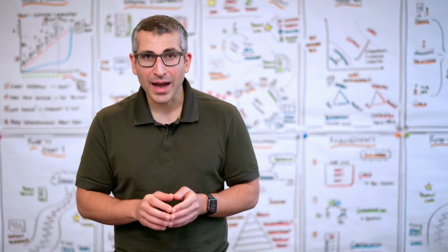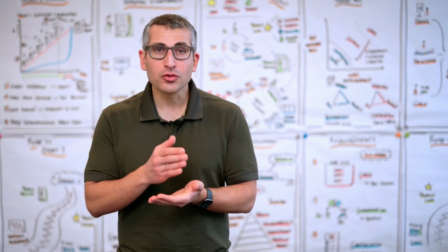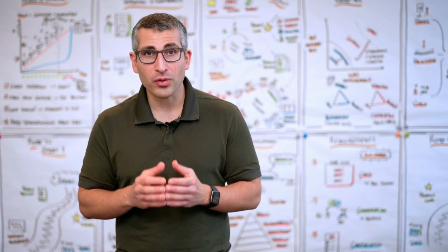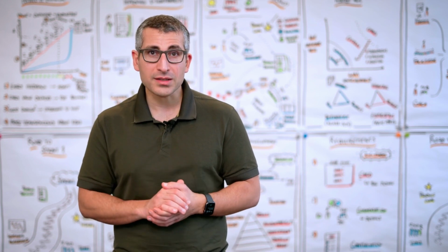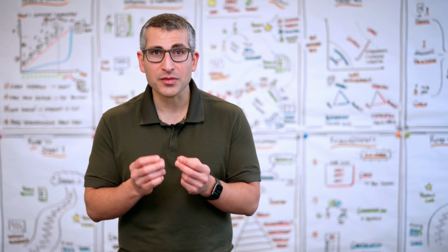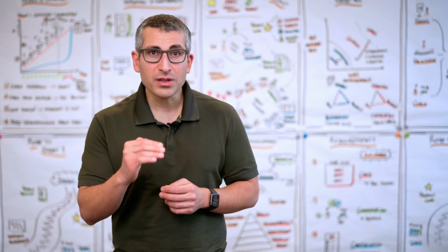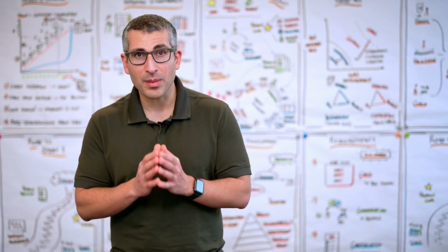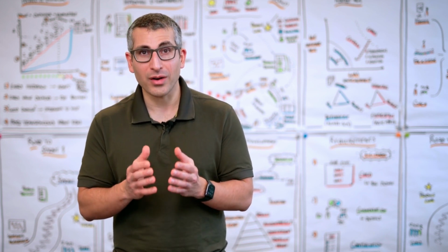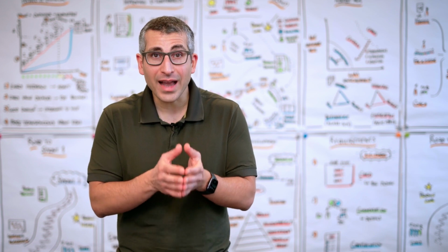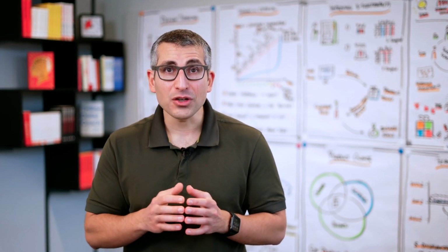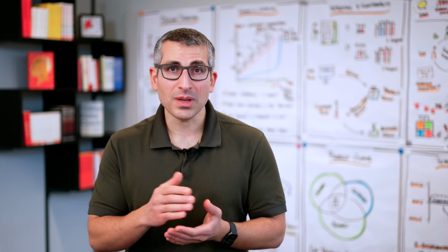You can also apply the work in progress limits to drive further collaboration, to drive, for example, pair programming, or pairing if you're not working in a software context. Let's say again, you have a team consisting of 6 team members. If you reduce the WIP limit to 3, your team actually has to do pairing, because otherwise they can't actually do their work. So work in progress limits are also a lever you can pull to drive certain behavior.